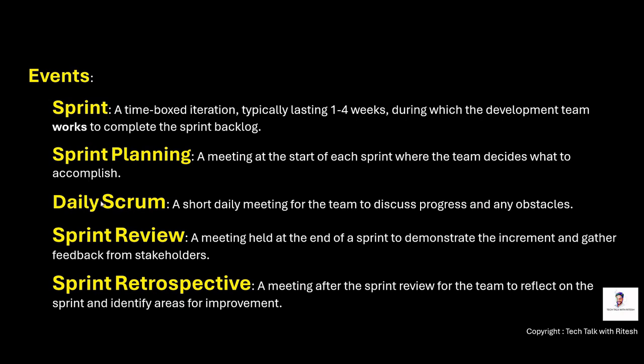So in the scrum, daily we have calls, that is called a daily scrum, where the development team, all the team members, join the call for 15 minutes. They just update what they have done yesterday, what they are planning for today, is there any blocker, and typically it should end within 15 minutes.